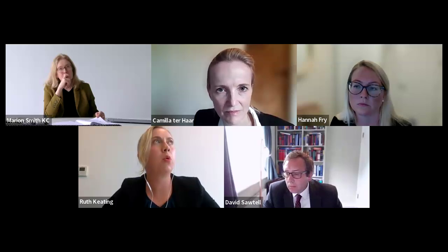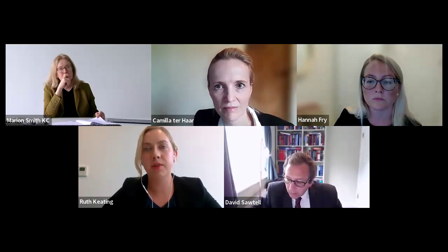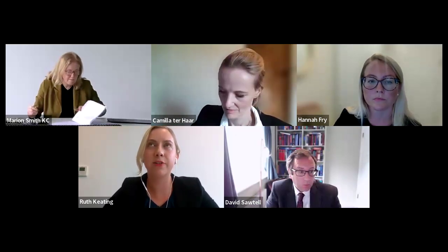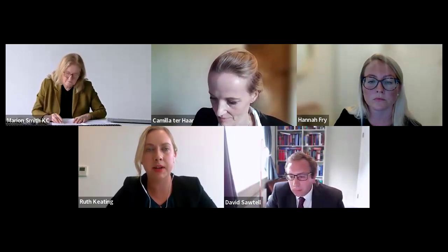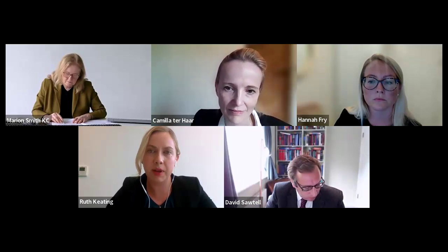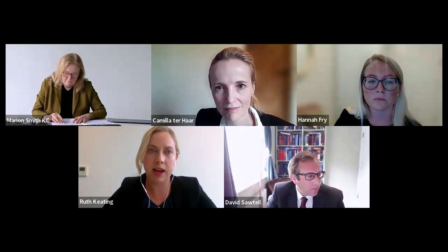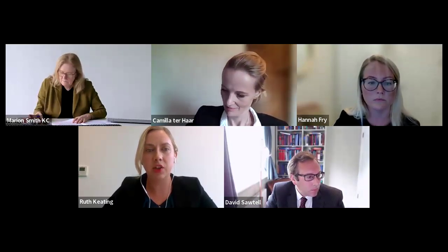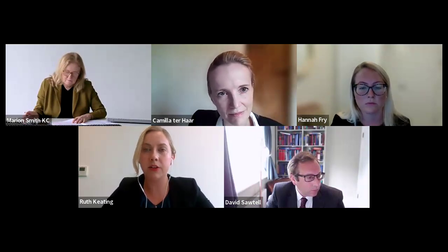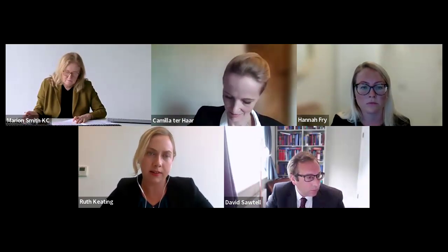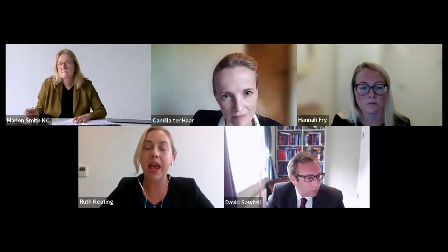So Marion, I think the important point is that if the contractor proposes a change, they are going to have to explain to the employer how is that going to work. And that's a real practical issue that arises in the context of net zero and sustainability, particularly when contractors make suggestions as the contract is ongoing. So I think the first question the contractor needs to ask themselves is, how does this change fit with the overall project, and are there any knock-on effects? If they decide that the change has a benefit and the test that's laid out in the clauses that it's economically viable, they then need to ask themselves, how am I going to evidence this?